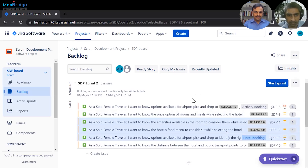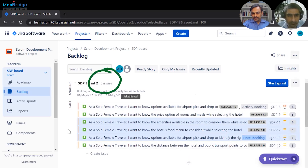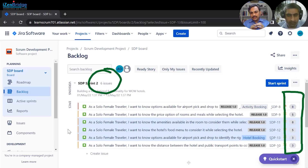Let's look at the sprint summary. You can see there are six issues. You can see the user story points that have been picked up. If you are doing velocity-driven planning, the number of story points is your key decision-making factor for how many items to pick. If you are doing commitment-based sprint planning, you need to do detailed planning to confirm whether all these items will fit in the sprint.